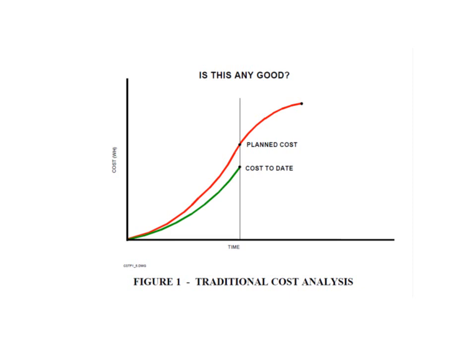So similarly, if the cost was higher than planned, you might say, well, that's bad because you spent more than you planned, but it depends if you've done more or fewer jobs than you planned to do. So you cannot tell the progress of a project on cost alone or time alone. You need a combined measure, which is where the concept in project management of something we call earned value is used in projects to determine how well a project is progressing.